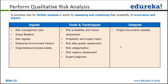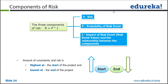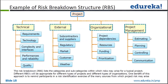The next step is quantitative risk analysis. The risk score is found by multiplying the probability of the risk event by the impact of the risk event. We also create a risk breakdown structure to ensure we have considered every area from which risk can happen: technical, external, organizational, and project management. For an IT project, these four categories should cover most risks.